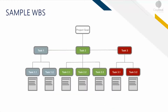Here's a sample WBS — just a sample portion of a full blown work breakdown structure, with some branches of the WBS decomposed down through the work package level as shown in the diagram. You have the value management system project on top, divided into needs assessment, standards development, and so on. The needs assessment has further subtasks, and you can see the labels going from 1, to 1.1, to 1.1.1, and so forth.